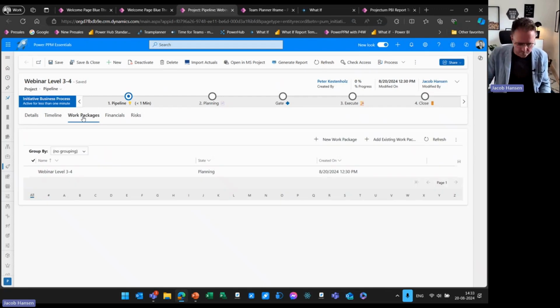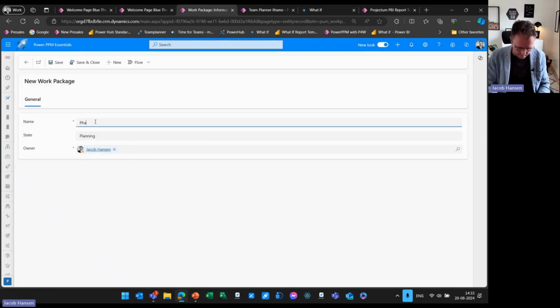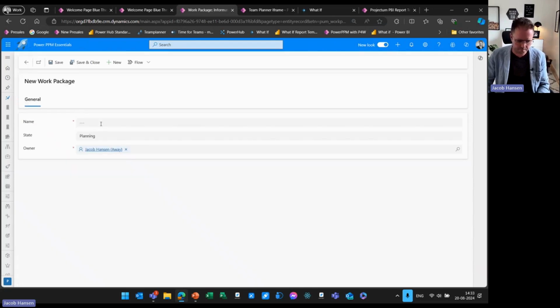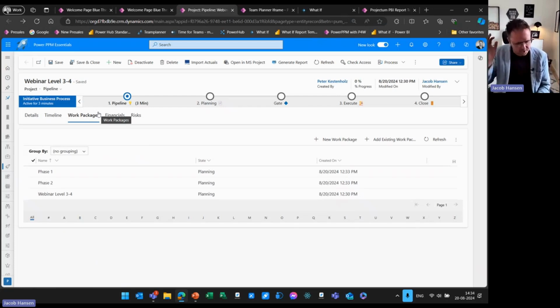If I go to my overview of work packages, it will be possible to create different work packages. It could be phase 1 work package, save and close. It could be phase 2 work package. In this case, I can create different work packages that I will send off for allocation and receive the allocation form. In this case, we just assigned it to the webinar for the entire project.